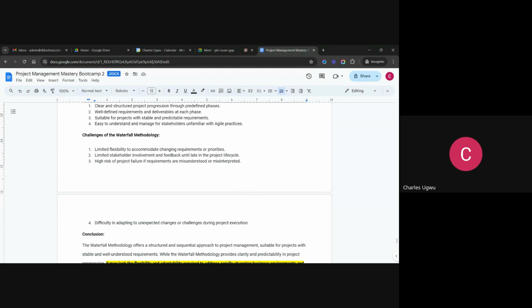Unlike Agile, where they build small software and keep bringing it to the stakeholders to inspect. In this case, they don't build in small shipments. They build the whole software and then deploy it for inspection, and by that time you find out that you built the whole software and there is a gross mistake. That is a very big risk.